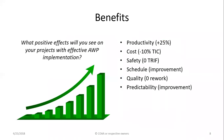What are the benefits we're chasing? Research conducted by the Construction Industry Institute shows 25% improvements in labor productivity, 10% reductions in total installed cost, TRIF rates dropping to zero on some projects — meaning nobody was hurt, including driving to and from the project. We've also seen better schedule attainment, rework dropping to zero, and much better predictability. We want to see these outcomes on smaller projects as well.